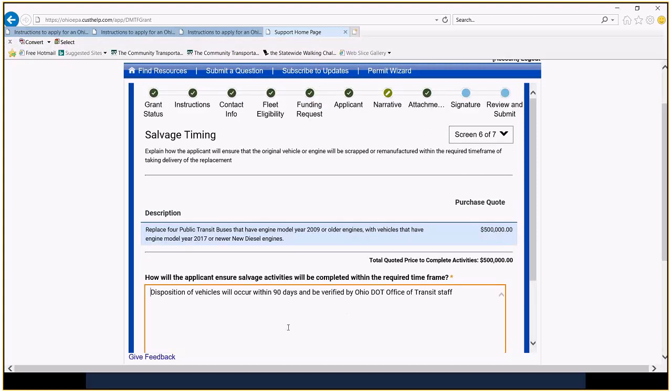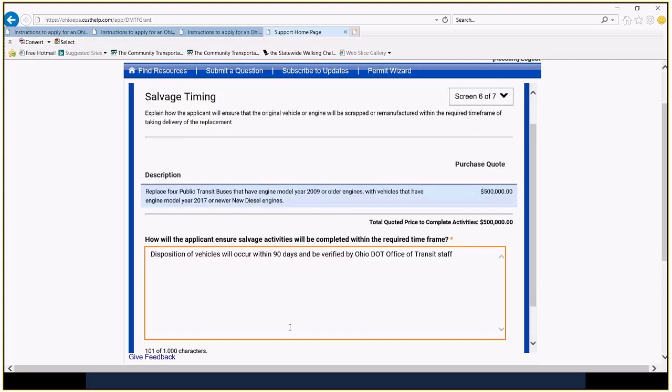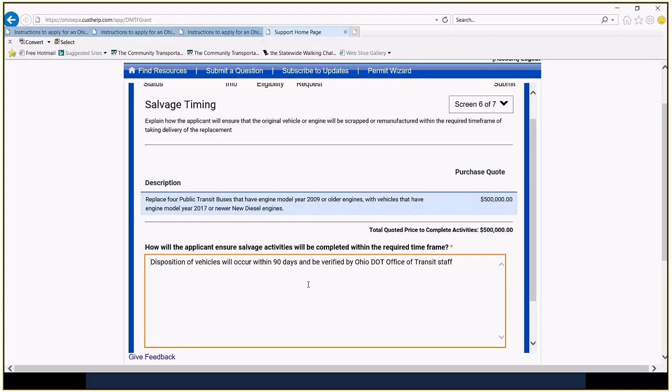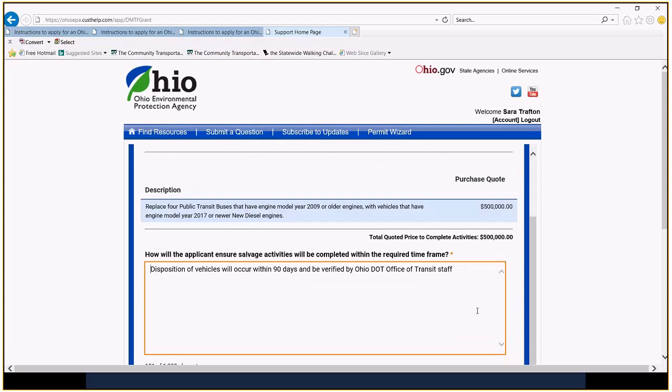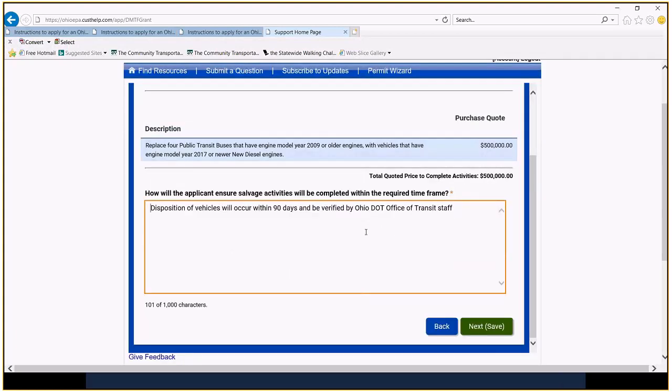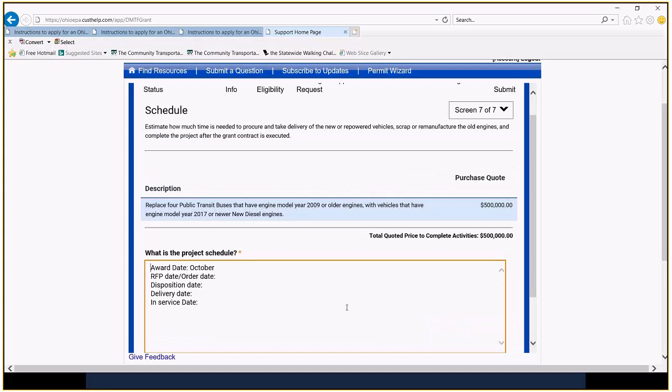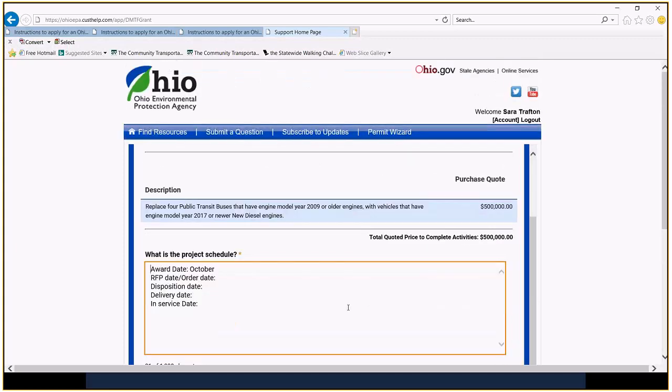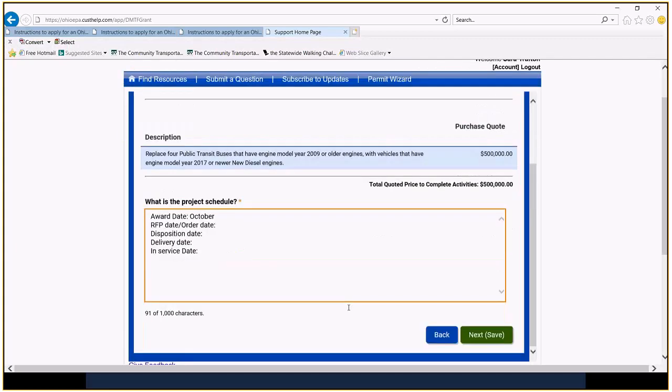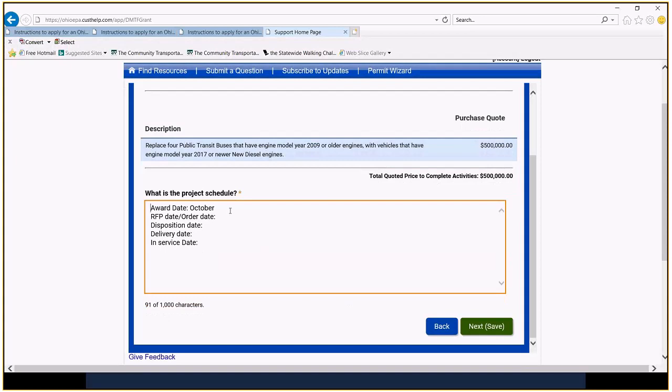A quick description of how you are going to ensure that your salvage activities will be completed within the required timeframe. That's within 90 days of the new buses arriving. I don't think that should be much of a problem for folks. You're going to want to just describe that activity, how you're going to do it, and when you plan to do that. Project schedule, I have not done very much on this at all, but we're going to want to put in dates, the award date. If you have to go out to RFP, you're going to want to talk a little bit about the process for that, the dates that you might be doing that. If you're ordering off the state term contract, that will be what you fill in. Disposition date for the old vehicles. Obviously, that's going to be after the delivery date of the new vehicles and then when you would plan to have those service.